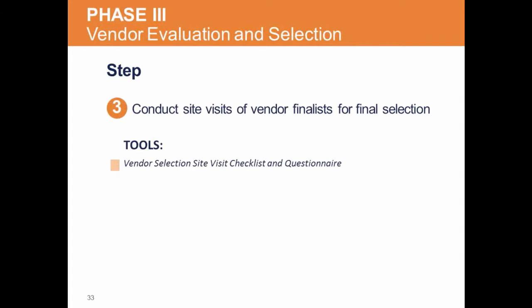On-site visits are a great way to see how other colleagues in healthcare organizations use the vendor software product in a live patient setting. We recommend that you visit a site that is using one of the EHR products that has made the final selection list to get a better feel for how the product is used in other organizations. Your vendor finalist will provide a list of organizations that are willing to host a site visit. Your organization's key decision makers should be able to narrow the selection down to 1 or 2 EHR vendors after evaluating the RFPs and completing at least one visit.